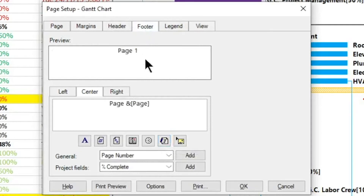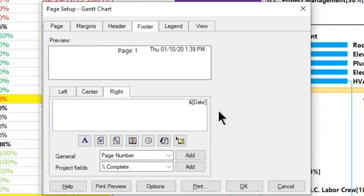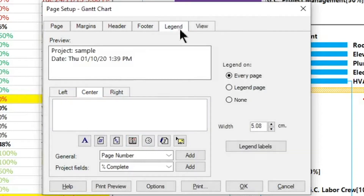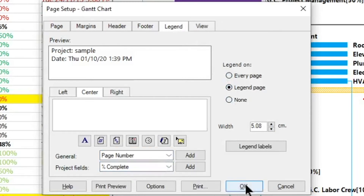Now in the Page Setup dialog, select the Footer option. On the center tab, by default there is the pagination. On the right tab, click on the Date button. As you can see, on the Legend tab, by default the legend appears on the last page of the printed document. You can also add the legend on every page or hide it.